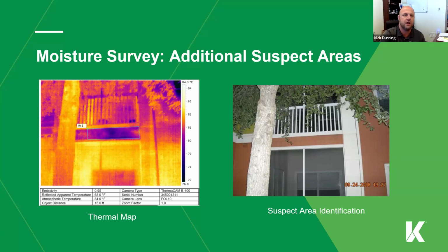Let's get those fixed. The SIRS is not just, let's make sure the structure is maintained, everything else, but other things that affect the structure. So our waterproofing, our paint, all of that. But you wouldn't go out on a milestone inspection where the structure is good and they have terrible paint and fail them. That's just not reality. But with SIRS, you'd have, hey, you need to paint next year, so you need to start getting that money together. So you kind of separate those two of what their intents were.